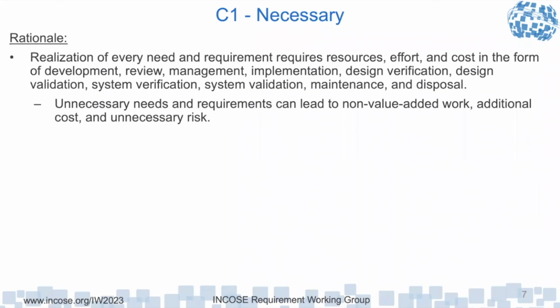If it's COTS, of course, then it's against the figure bid. But if it's a development contract, then you might want to include stretch targets, recognizing that the project has to have the budget or contingency to be able to invoke those requirements when they come in. Does that make sense? We should show the Wright Brothers specification, which was the first value management contract. One requirement, fly at 40 miles an hour across the ground or whatever, but a bonus was given for each extra mile of speed across the ground by the actual contractor. So it depends on how you want to contract, is my point.